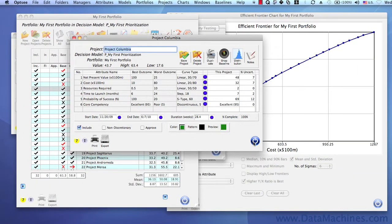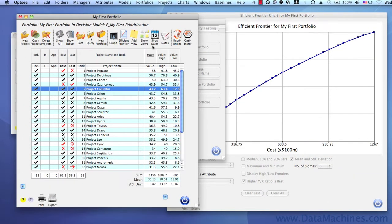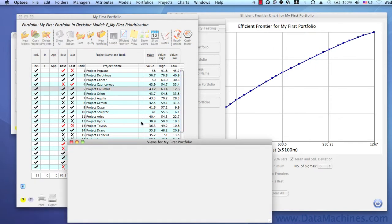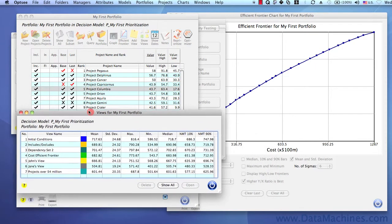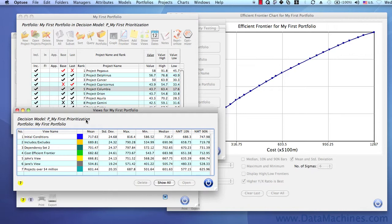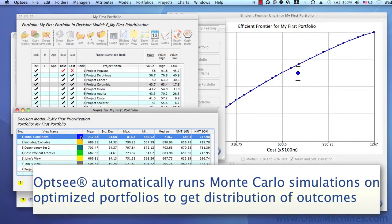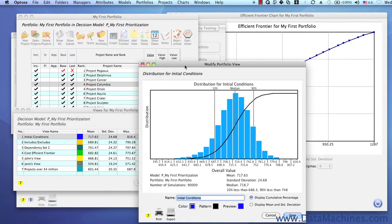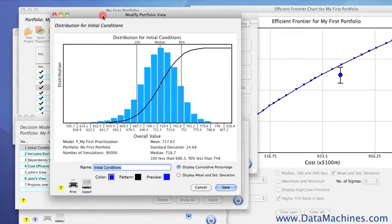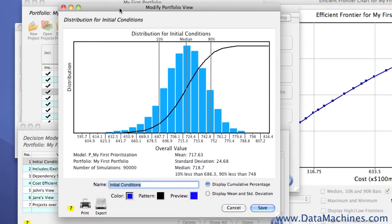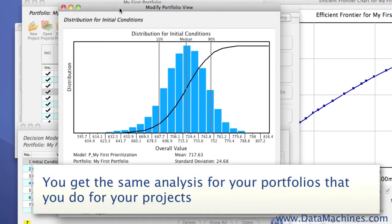But having probability distributions for projects alone isn't enough. You need them for your portfolio selections too. OPSEE automatically runs Monte Carlo simulations whenever you run an optimization and lets you easily run your own Monte Carlo simulations on any portfolio that you select manually and save as a view. So just like projects, you're not guessing at what the distribution around your portfolio value is. You know what it is based on the uncertainty in each individual project.